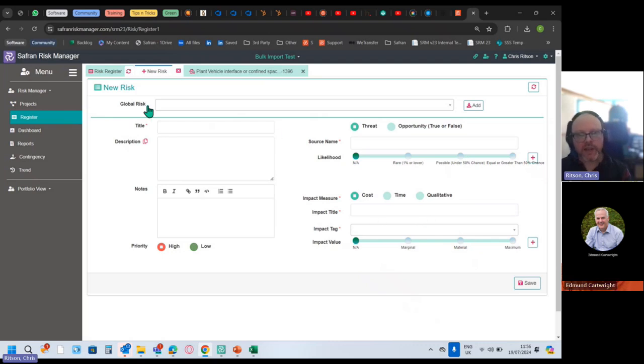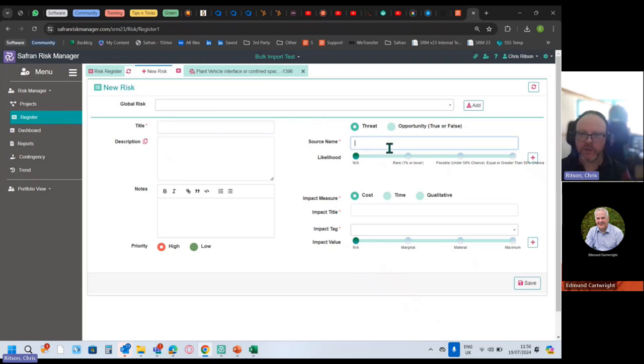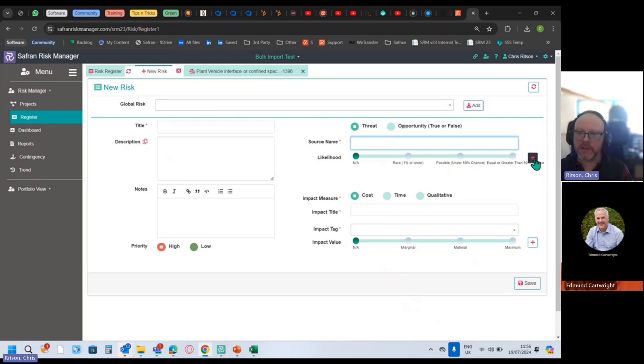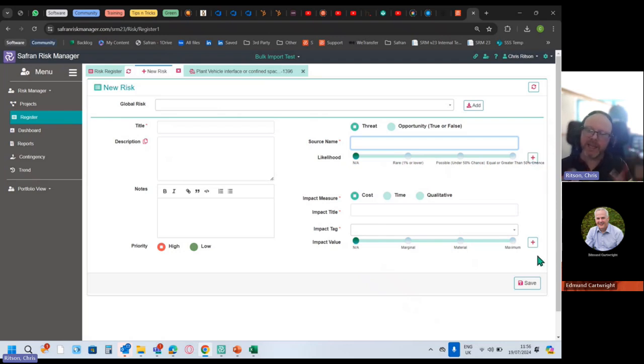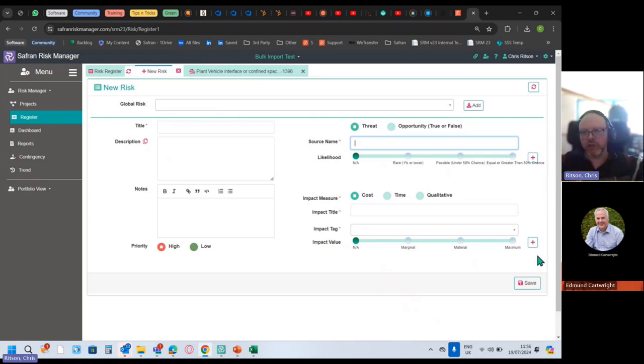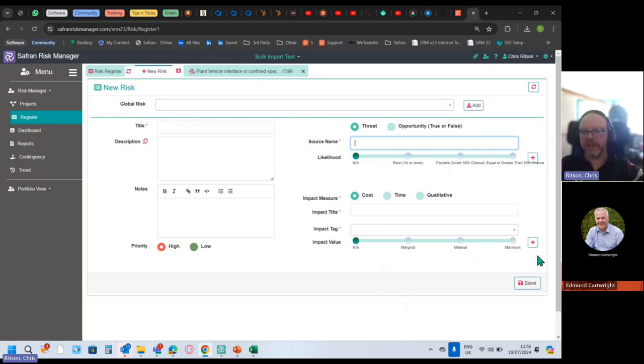That's the global risk approach. Otherwise you draft and write out the description notes, what's the source, what's the likelihood of that source occurring, then you hit the plus button. It's possible to add multiple sources and start building that bow tie just in a really basic shape. You've got the bare bones of the bow tie, or you don't have to do a bow tie. Just a single source and a single impact is the bare minimum.